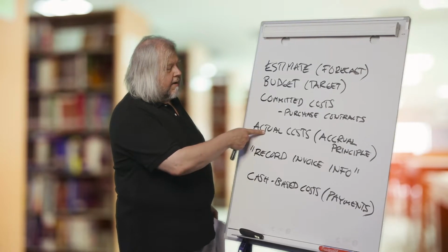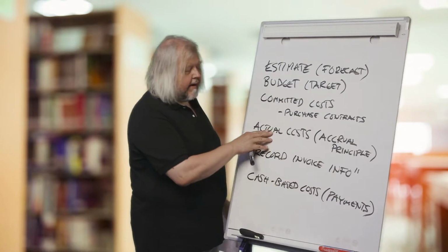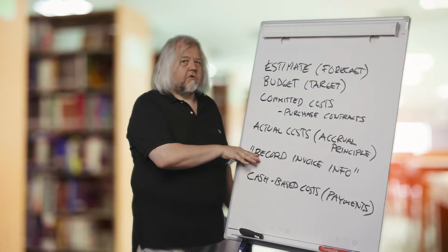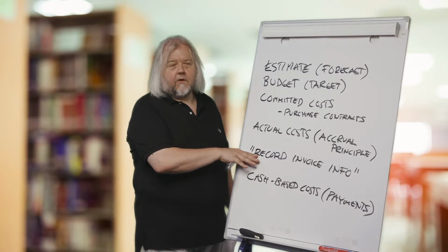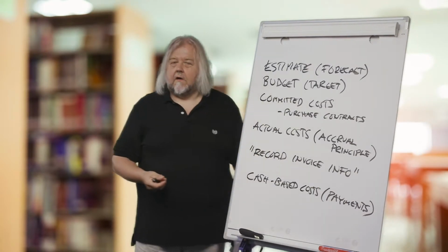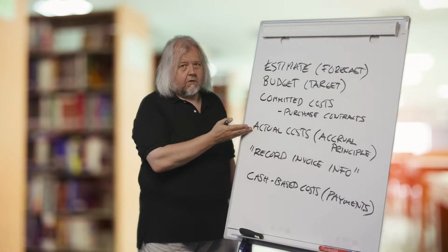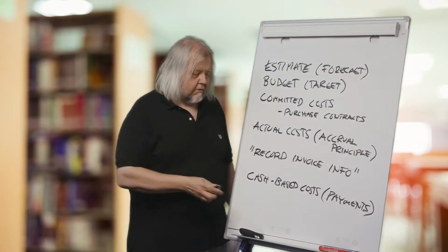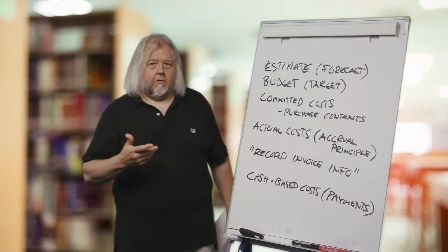For example, if I deliver the service of moving the pen and the cost occurs, it might be that it takes me a year to send an invoice and I can give payment terms for another year. So it might be that the payments take place only 2 years from when the actual costs occur. So I think that this is important also to understand when we are managing projects which are connected to firms'